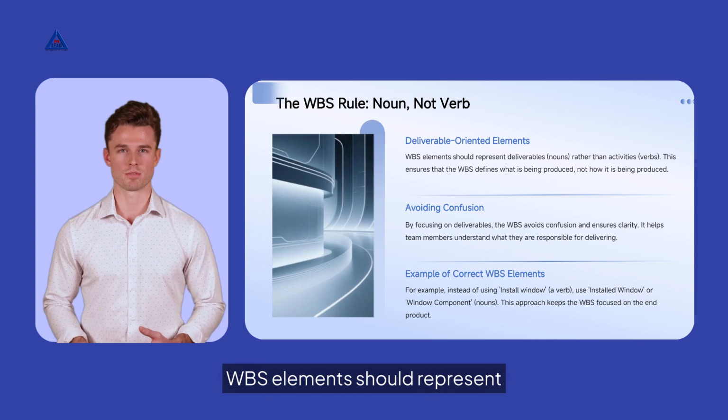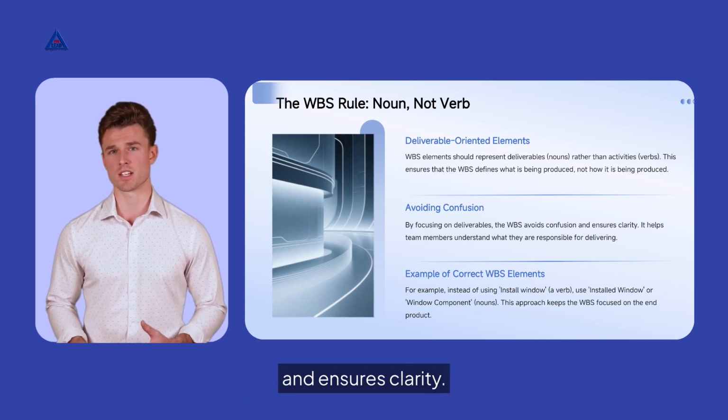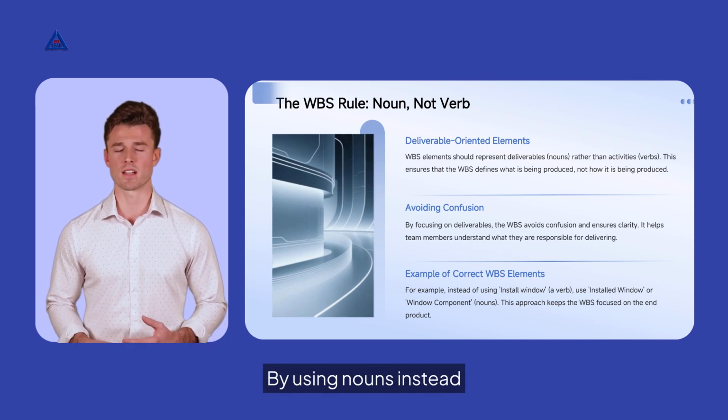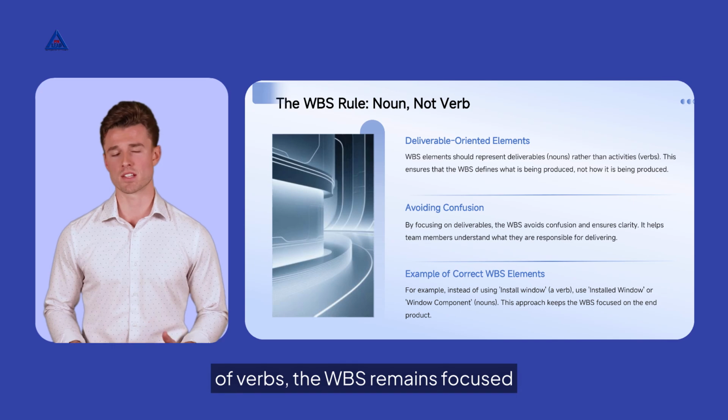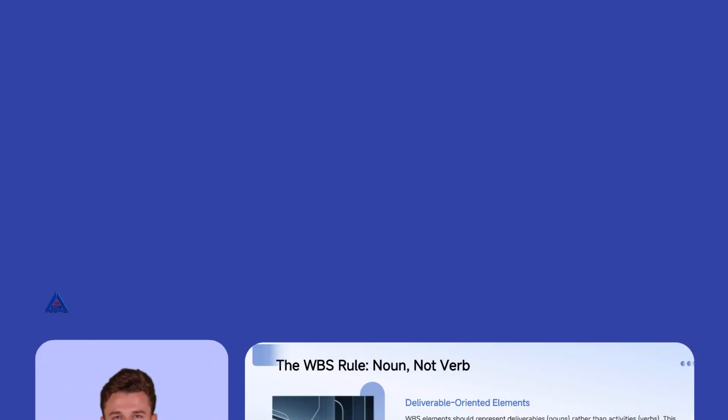WBS elements should represent deliverables, not activities. This focus avoids confusion and ensures clarity. By using nouns instead of verbs, the WBS remains focused on the end product, aiding in effective project management.